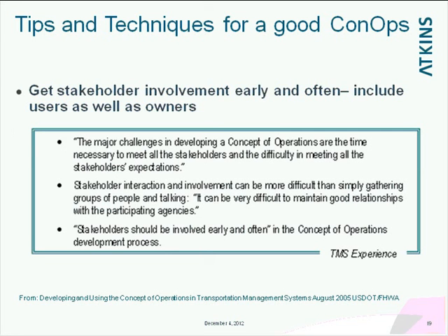And in my case, when I'm doing advanced transportation management systems, which is command and control for the highways, for the different state DOTs, I like to get the actual operators that operate the software in early on and get their feedback and get their opinions, because eventually they'll be taking the software and using it. So it's important to get their buy-in early. People hate change, so the earlier you can get them involved in owning the change, the better you are.